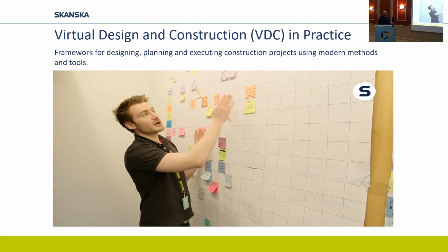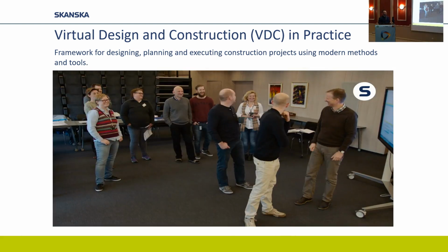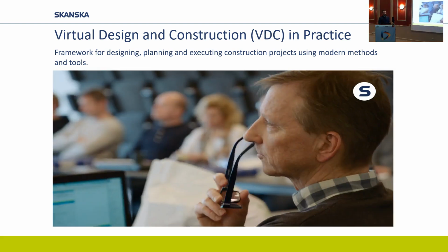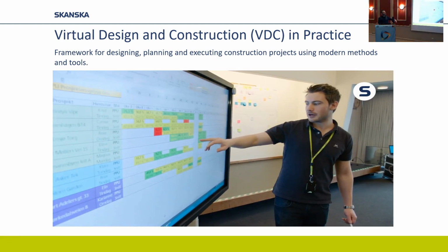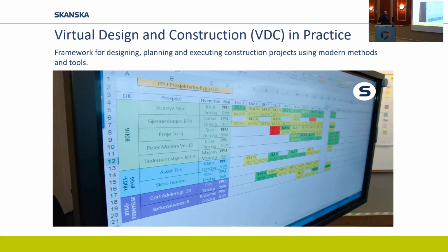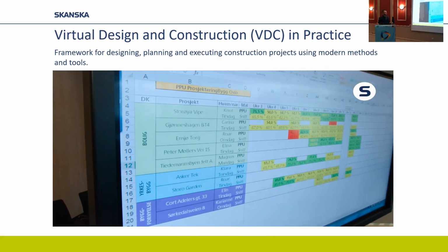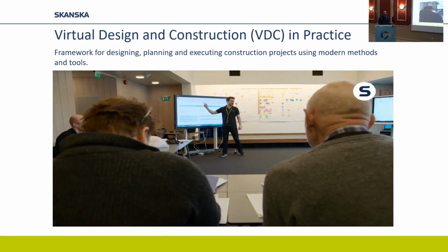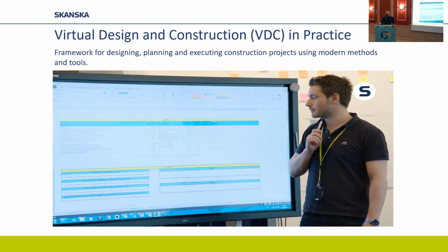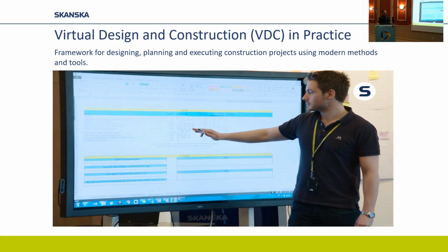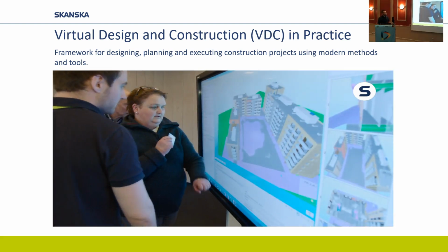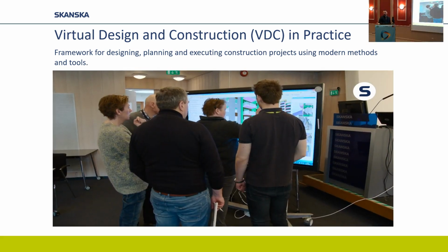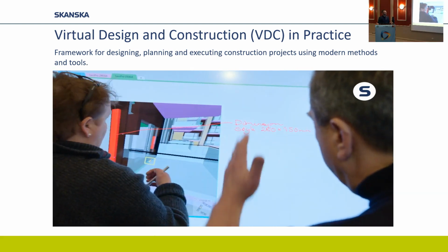So the first thing we do, we go through the plan from our last meeting, which is usually a week or two before, and we measure PPC, find the root causes, and have a conversation about it. Then we do look-ahead scheduling afterwards to make sure we have control in the future. Broken promises have to be remade and adjustments have to be made to the plan. Metrics are important to the sessions, to the teams, to make sure we're on track. If the lights are green, yellow, or red, should we adjust something or are we okay? Then we go into the actual ICE session, and that agenda you see there is very specific, all the way down to what items we are going to solve, how we measure if we're on target, and what the deliveries from these sessions are.